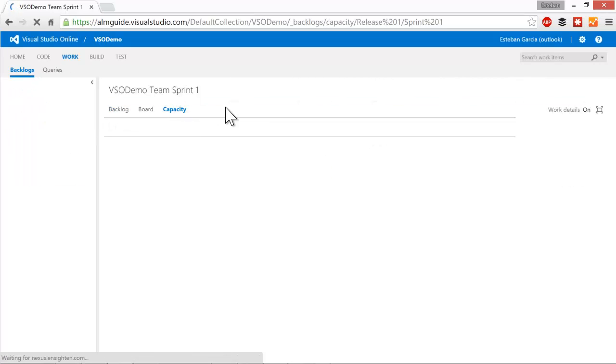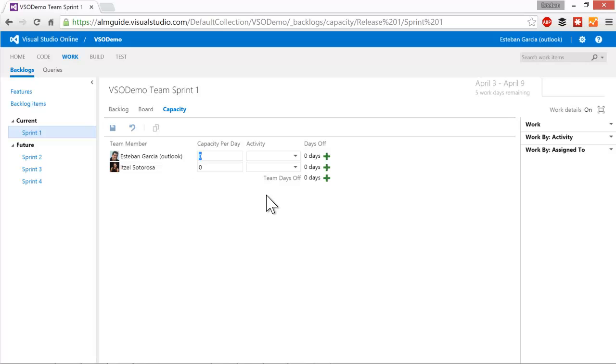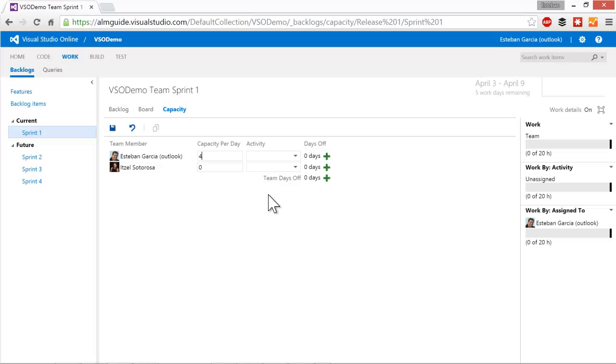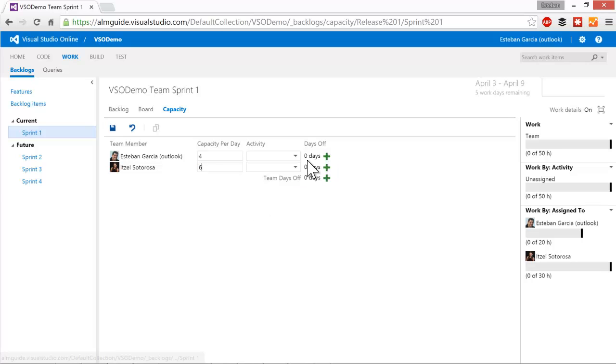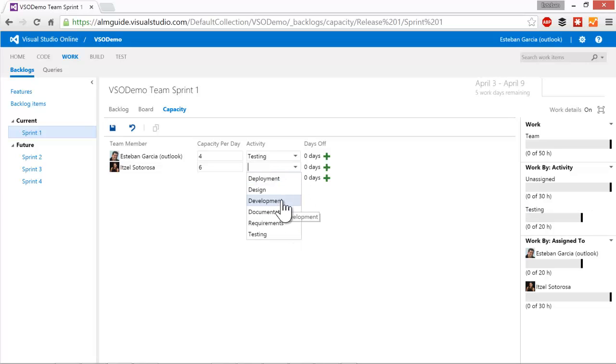Clicking on here, I see the people who are on my team and I can specify how much time they're available to work on this sprint. So let's say that I'm available four hours a day and then my teammate itself, she's available six hours a day. And during this sprint, my role is going to be of a tester and her role is going to be of a developer.